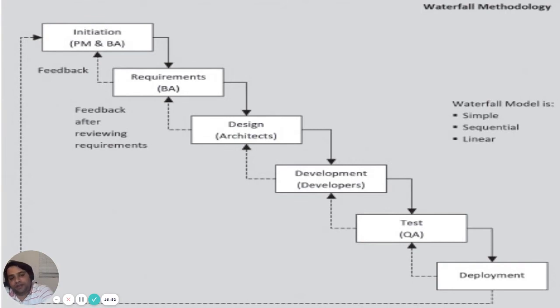Also, freezing requirements usually requires choosing the hardware. So a large project will face the problem that they have to employ technology and roles early. That means resources are not utilized to their fullest potential in the waterfall model. Sometimes QA has to wait for their turn. It can take 6 or 8 months to complete development, and QA is not doing anything, right? This is not ideal. These are the limitations of the linear methodology, or waterfall.